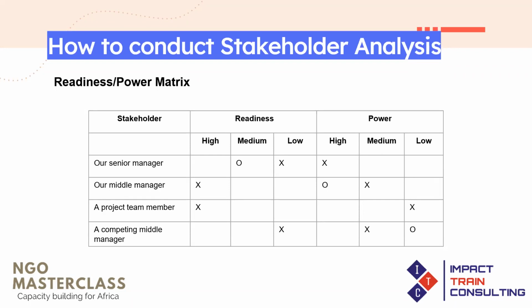But while we were analyzing the stakeholders, we agreed that involving her too much might derail the project. It might make the project more political than what we wanted. So what we did was to identify other key government stakeholders and relate with them more in implementing the project, while we related with the mother of the governor less,